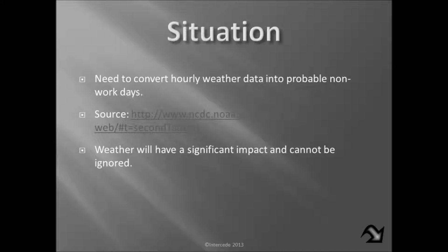Now, what we did in rain delay before was take the average data for, and we used the weather base for that, rainfall in excess of 0.20 of an inch, or 0.2 inches. And we're going to use that same metric, though I'm beginning to believe that we could reduce that to 0.1 inches to determine a rain day, though that is still indeterminate.